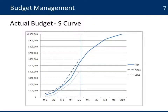Let's look at what would happen in the project when we are halfway through it, and we compare the data of what we planned with the actual value. The actual value is this dotted line that shows me that the project is costing me more than what was actually planned or estimated. The other line represents the percentage of the value that we have been able to deliver in the project in terms of cost of services. We have done a certain amount of work and completed that in our schedule, and then we compare that to the percentage of the 100% value of the project — and I can see there is a difference. That difference means it is taking me longer to work on the project and it's costing me more to do that work.